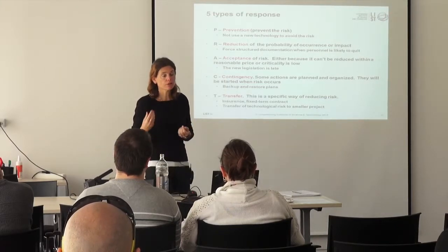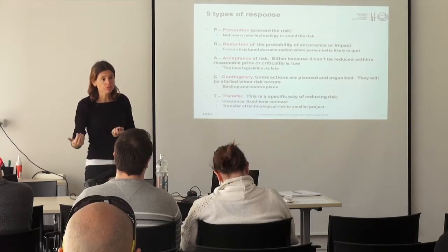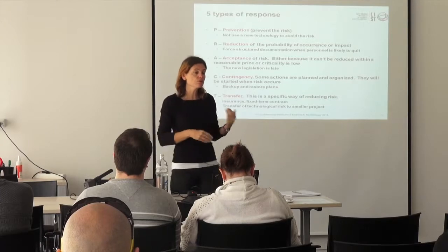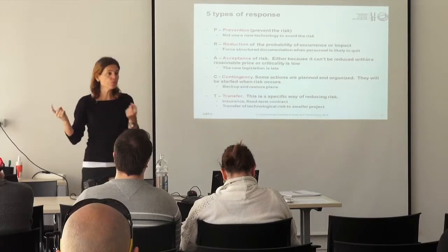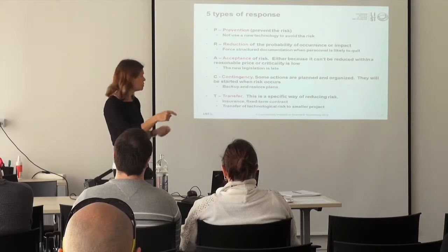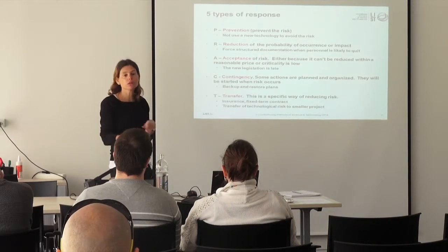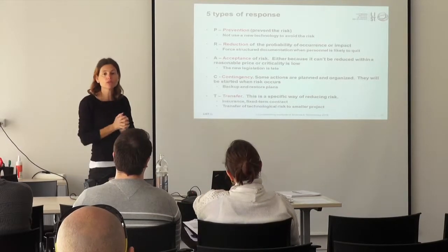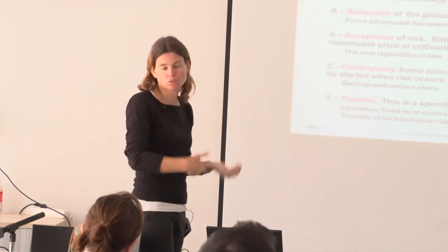Contingency actions are there so that you've thought about what you could do before the risk is actually occurring. So you have thought about, okay, if that person is leaves, we'll define a team of 2 people who will take over that role, because one has followed the work. So with my reduction action, one has followed the work of that person and they had a regular meeting. And the other one has these competencies, so put together they might be able to do a good job. So this is what we're going to do if that risk occurs.